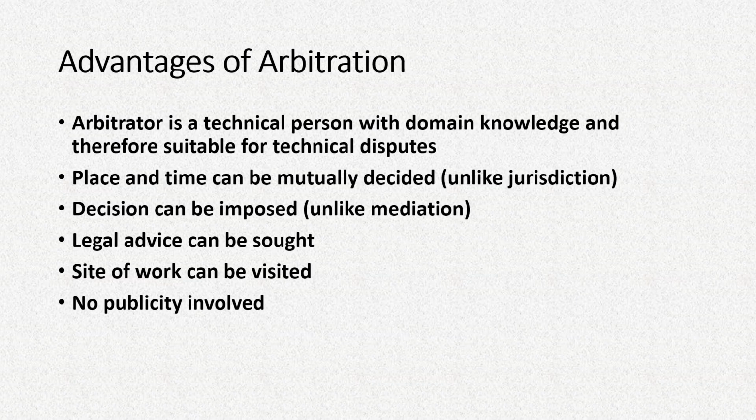What happens in a court of law is that it's very difficult to bring the judges or lawyers of the court to a site. And since we are talking about the construction industry, if something goes wrong on a site, the evidence will be on the site. In the court of law, those evidences cannot be directly brought there and we will only have to depend on photos or videos and so on.